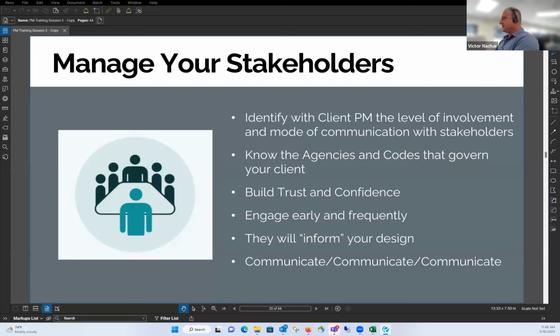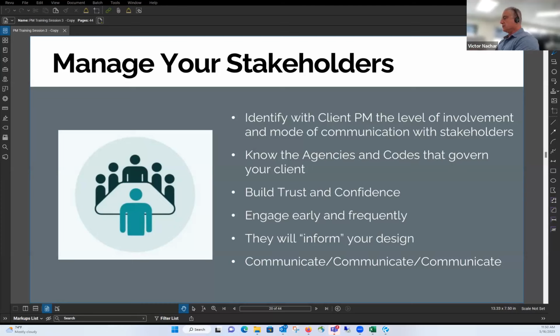My apologies. So, key points that were touched on, I call it the project roster. Very, very critical that the project contact list for the stakeholders, internally and externally, is regularly updated and maintained by the project manager. This causes a lot of issues because if we don't have the correct project roster or project team list, then things could be sent out to individuals that are either no longer with the company or no longer are on the project. So that has been one experience.